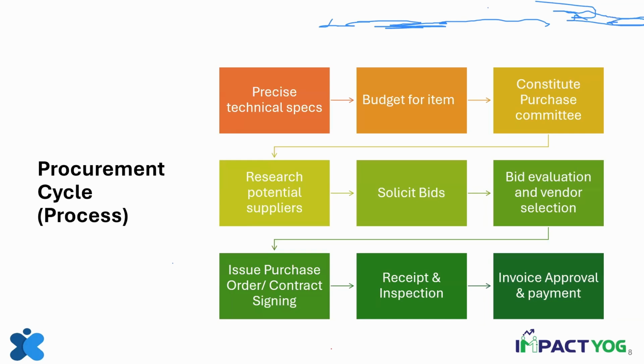At the end of the procurement policy, you will find a lot of these templates, and they might also include the template of the purchase order, because that purchase order template has to be followed uniformly by all the people, whether at any location, at head office or wherever, so that there is standardization in terms of the terms and conditions of the purchase, the format, what needs to be included. Does GST need to be included? Is packing to be included? Is transportation to be included?